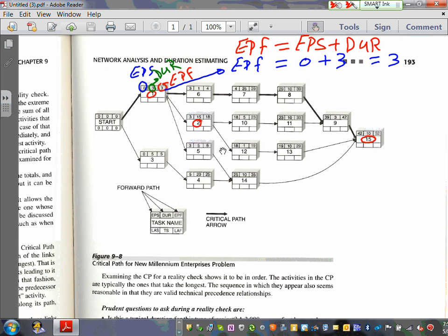Look at this activity right here. Now then, the second activity, guys, starts at 3. Can you guys see that 3? So can I have your attention, guys, for a second? So activity number 6 here, which is tied to activity number 1. In order to move to activity number 6, or task number 6, you have the earliest possible start. The earliest possible start has to be 3 weeks because you can't finish this one, right? You have to finish activity 1 to start activity 6. That's the Gantt chart, guys. Remember when we were linking them? So that's why this is 3.